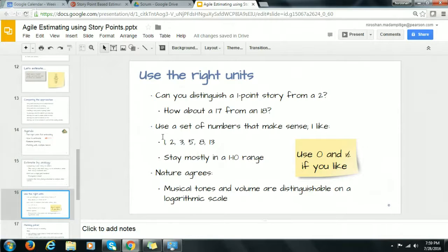Now let's take a scenario. Let's assume you're going to do a login page. In that, there's a story called create the HTML layout. Let's assume this takes an estimate of one story point. Now, if there's another story to correct a minor typo, just a one-letter typo, what is your estimate? Now, you face a problem. Why? You estimated something bigger and now you don't have a measure to size the typo-related user story.